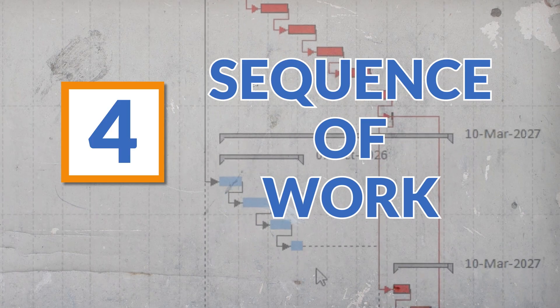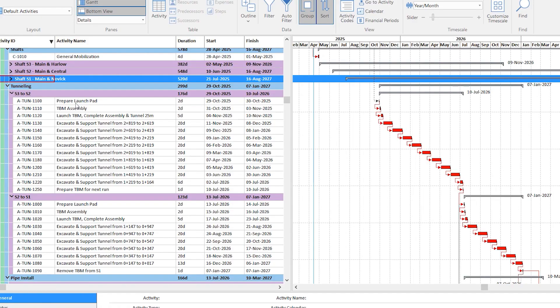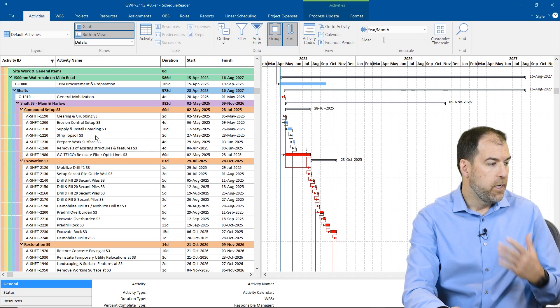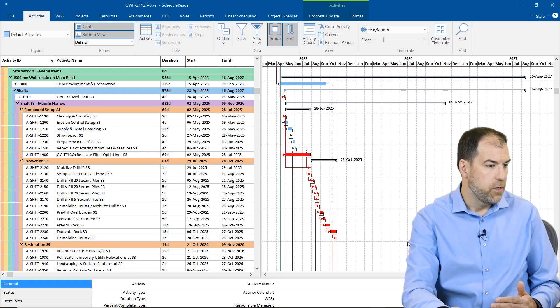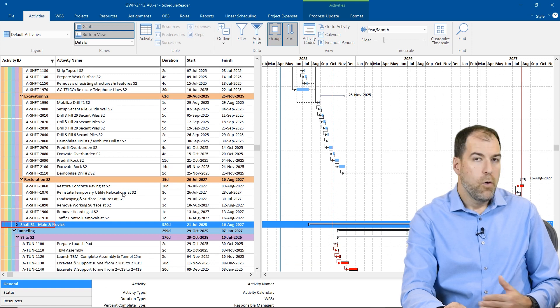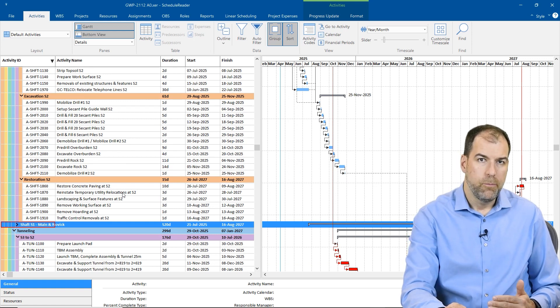One of the most important things is to understand the sequencing of work, and sometimes you can look at it and it's super obvious. For example in the tunneling section, we're tunneling from S3 to S2 and it's broken down into all these sequential activities one after the other — a lovely sequence of straight-ahead work. But sometimes work is not so straightforward to understand and we might have to adjust our view. Looking at the shafts: I have three shafts on this project, each with a compound setup, excavation, and a restoration section. But there's so much work spread out that it's hard to see the big picture.